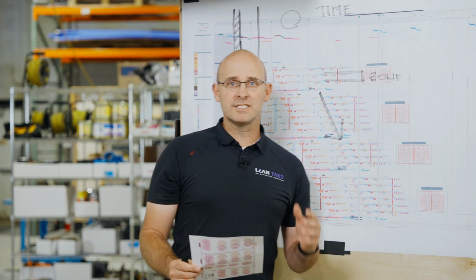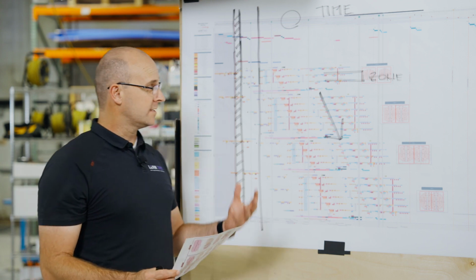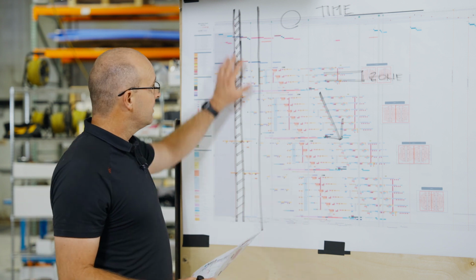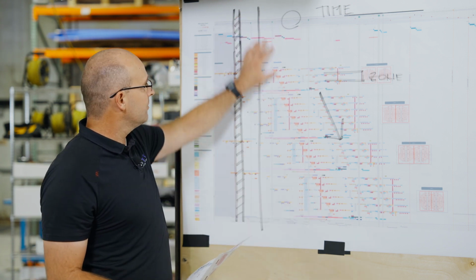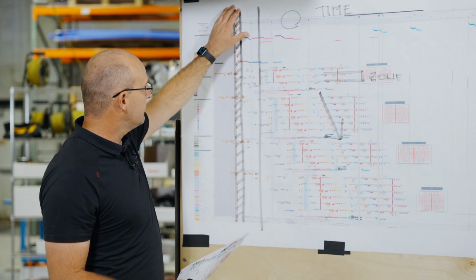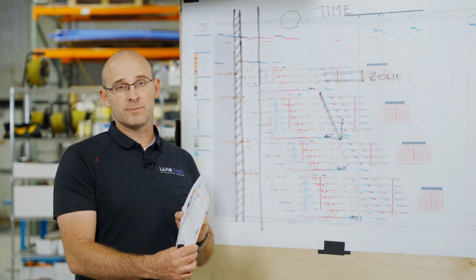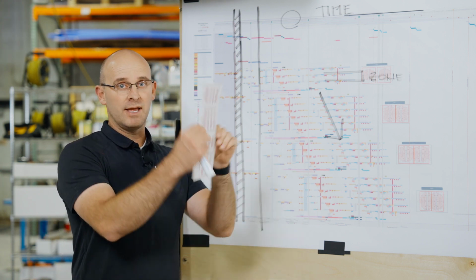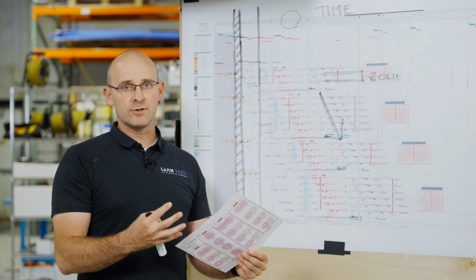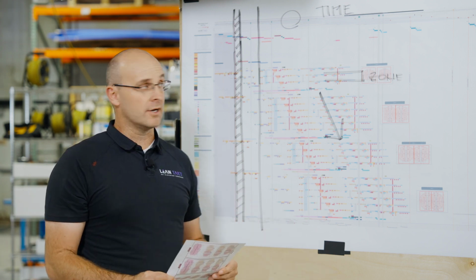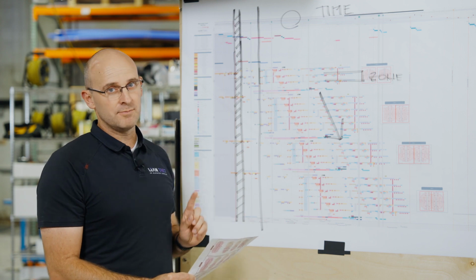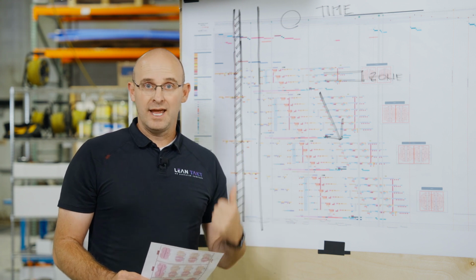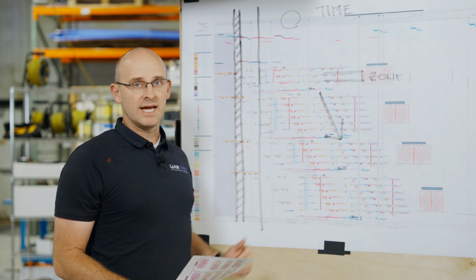So at its basic format with takt and last planner, you will start with a macro level takt plan early on, but eventually you'll get to the norm. And in this format, you automatically have your look aheads, you automatically have your weekly work plans, and your weekly work plans are designed to be taken into the field so that you can execute work in time and space and really implement zone control and know exactly what's going on, because you can see the plan, and here's the best part, it's all vertically aligned. So that is how you read and use a weekly work plan in the takt production system.